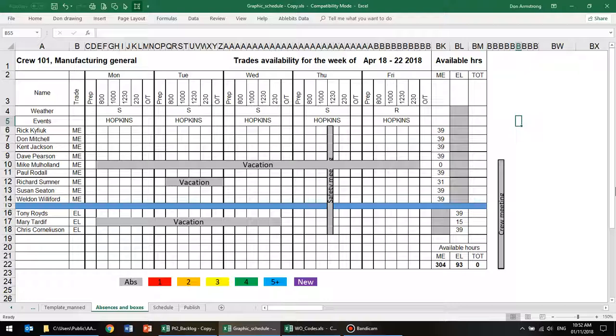When you're scheduling work, it's a good idea to first of all schedule the things that you can't change. For example, if you've got a tradesperson who has unique skills and can only do certain jobs, you should schedule those first, because that's a serious limitation. Then you should look at the longer jobs and fill them in next, and so on.